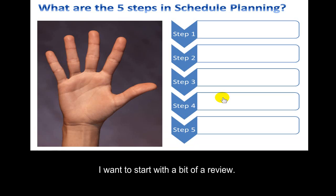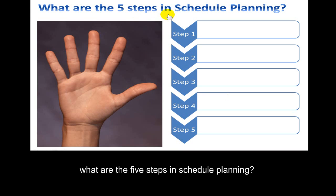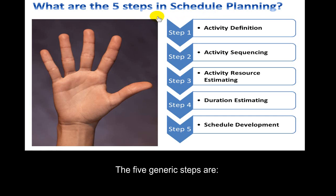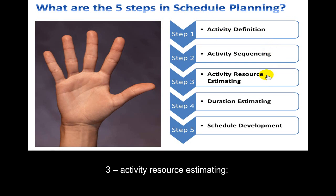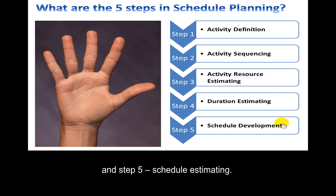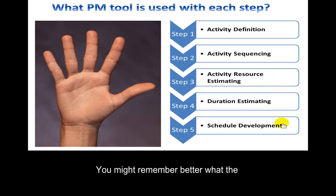I want to start with a bit of a review and answer this question: what are the five steps in schedule planning? The five generic steps are: Number 1, Activity Definition; 2, Activity Sequencing; 3, Activity Resource Estimating; Step 4, Duration Estimating; and Step 5, Schedule Estimating.